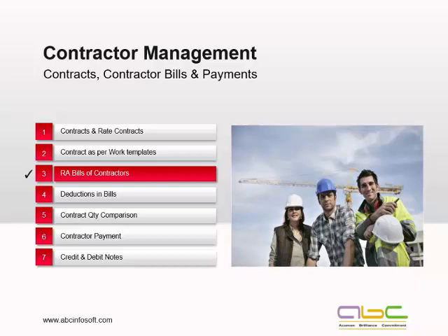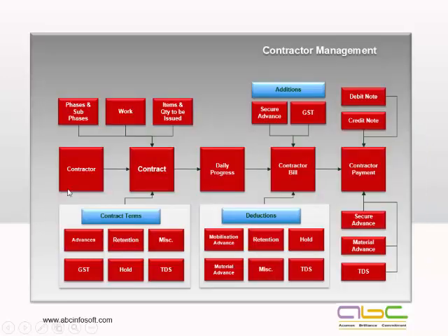Here we are going to deal with the entire transactions, entire work progress, and the billing of the contractors. To start with, we'll be defining contractors. With the contractor, we'll be defining a contract. Now, this is very important. For the contract, which phases and sub phases am I giving the contract for? What are the various works I have given this contractor? And is it going to be with material or without material, or it could even be partial. Also all my contract terms: advances, retention, miscellaneous, GST, hold amount, TDS amount.